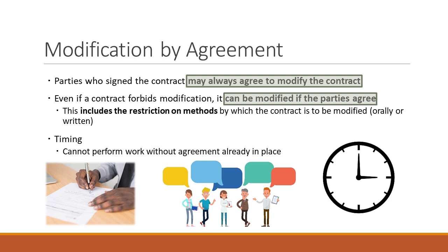And I wrote back to the contractor, and I said, as the owner, we can always change what we want as the scope of work. So I'm not going to agree to your request to say we can't unilaterally change. But see this sentence that says, see paragraph 8.2, that one has language in there that gives you the option, if we change the contract, you can charge us for it.